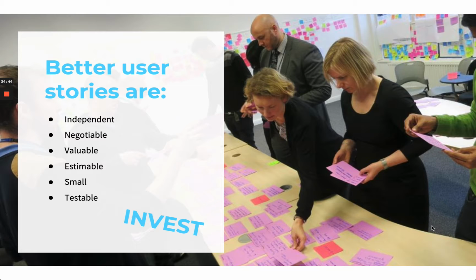So it's very important to understand for each story what is the value that we want to deliver, who is going to receive that value, and it has a very clear value written inside the story. So I personally always start my stories with the value written at the top. So everyone who opens a story can quickly see, oh, we are doing this story because of achieving this value.